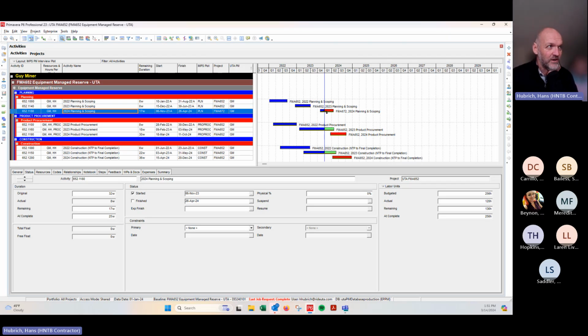And you'll see over here in the timeline, it's either going to be green or red. Red represents your critical path, meaning based on your schedule logic, that's the longest path to get done with the schedule. The green means it's a concurrent activity that's ongoing that does not affect the critical path or the longest end date of the schedule.